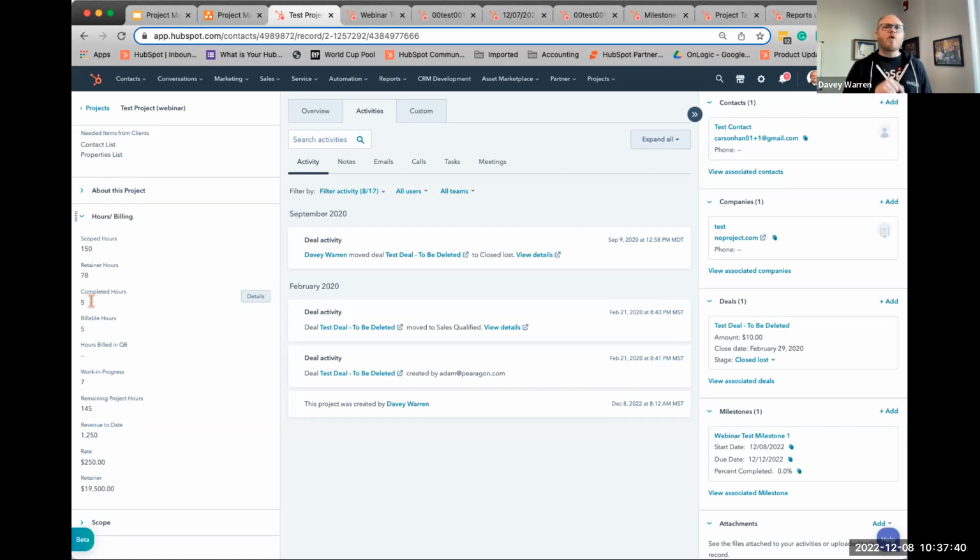And it helped our scoping so much as we went back and said, we didn't scope enough for this portion, or we didn't scope enough for this, or this person is not educated or trained enough, and they're just billing way too much time. And so we've narrowed that down, and our scoping now, we're at about 95 to 98% success rate on most of our scoping. And a lot of times we're coming under, by just a few hours on our projects, which is great. Clients are much happier instead of having to go back and be like, hey, we need more money.